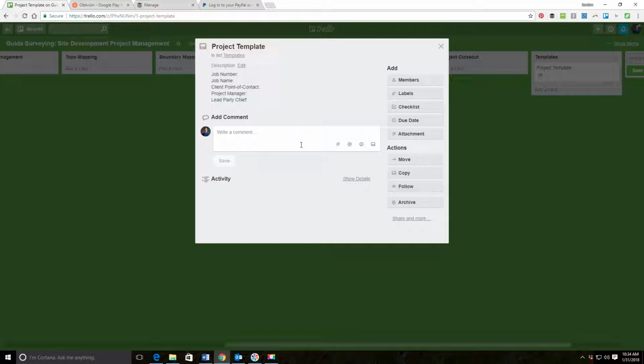And so part of what you can learn from this set of videos, in addition to how to set Trello up for a workflow, management of workflow, is you'll learn a little bit about how I manage these kind of site development projects. So I like to have an assigned project manager and at least a lead party chief. That party chief's responsible for all the field work that happens on a project.